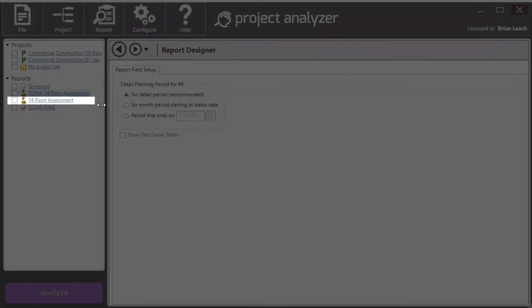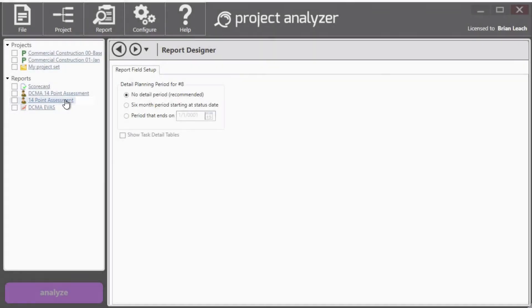The second one is almost identical. It's called the 14 point assessment. We dropped the DCMA. And the reason is because it uses the same 14 point criteria, except we allow you to change those thresholds and settings around those checks. And so it is not the official DCMA 14 point assessment. But if you think that you would like to tweak it, we provide the ability to do that.